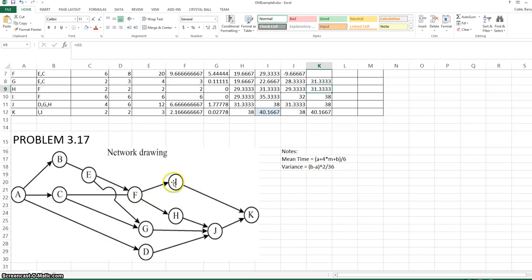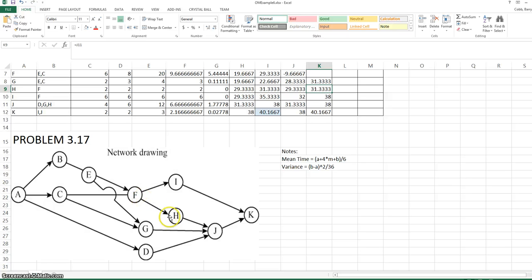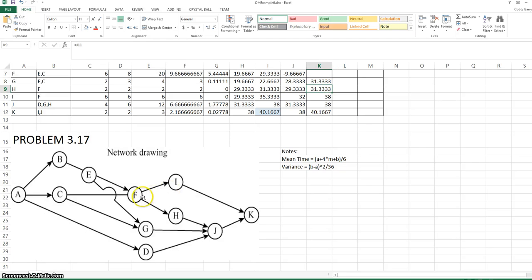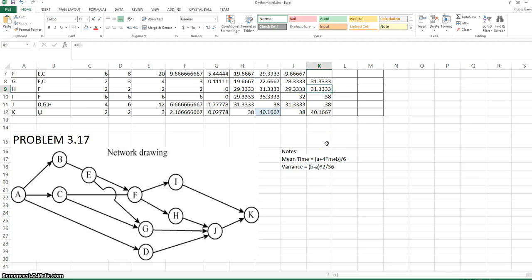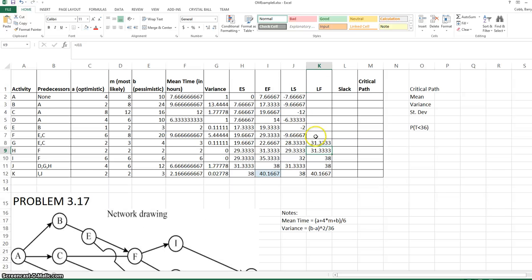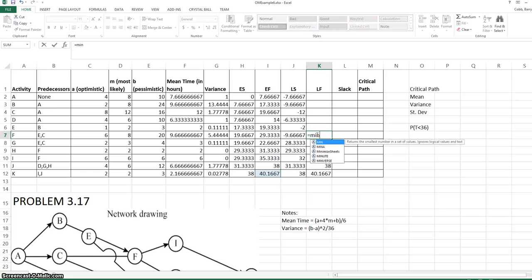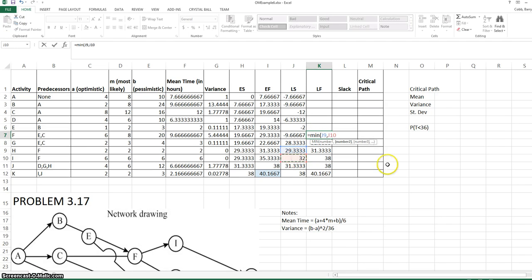F has two successors in the network. Remember, the easiest way to find latest finish times is to look and find in the network diagram the successors. The late start time for those successors will determine the late finish time. In this case, because F has to be completed before both of these activities, to keep the project on time, we would need to find the smallest late start time for the successors. The minimum of the late start for H and I.